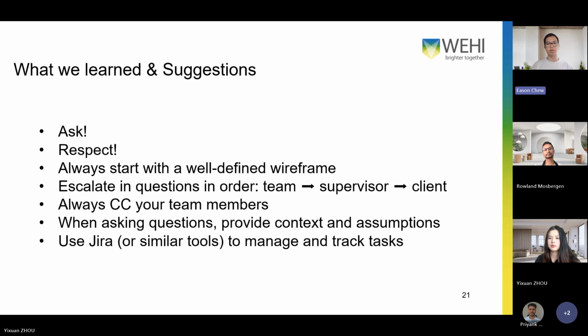We also adopted an escalation protocol, always discussing issues as a team first, then with Roland, and finally with our client Daniela. This ensured that when we did ask for clarification, we provided full context and potential solutions rather than just problems. Finally, using Jira helped us manage a shared project roadmap, preventing common pitfalls such as 2 members working on parallel versions of the same feature.